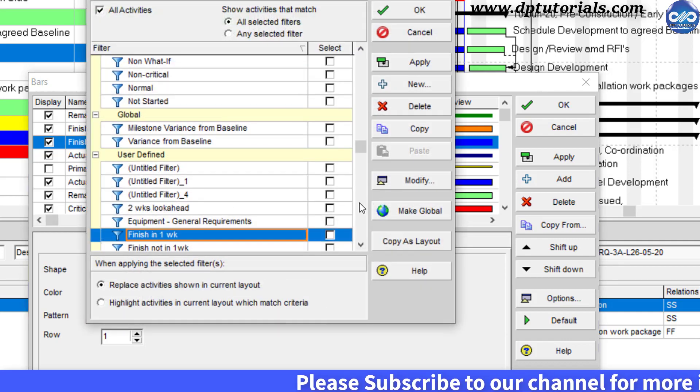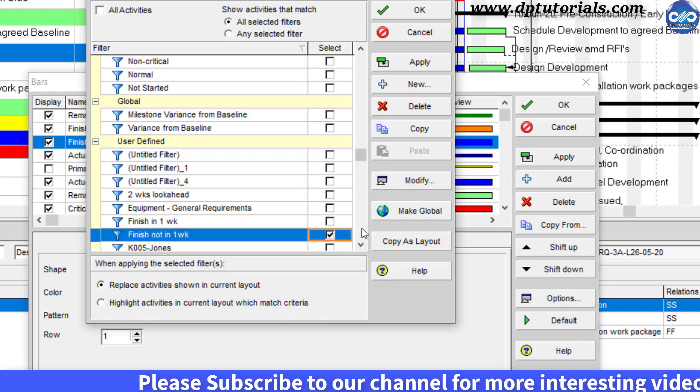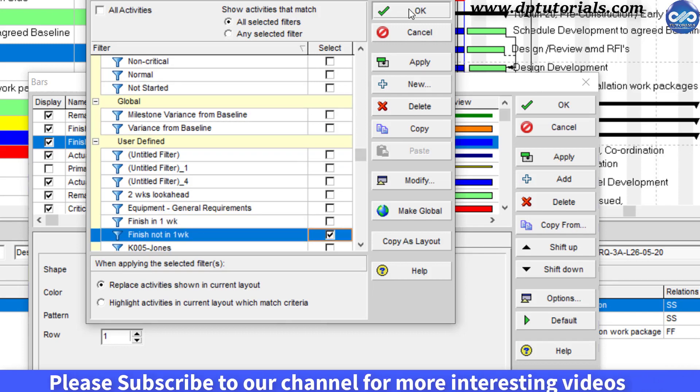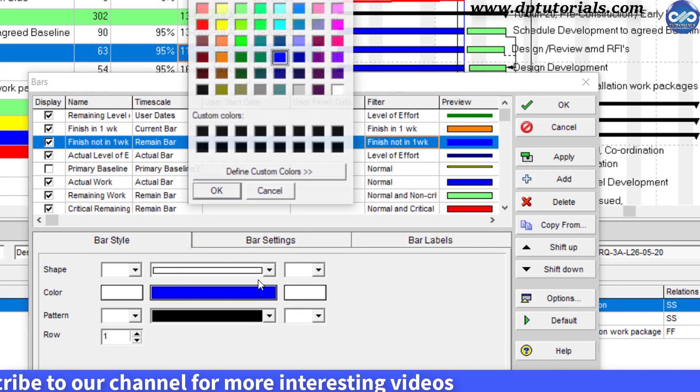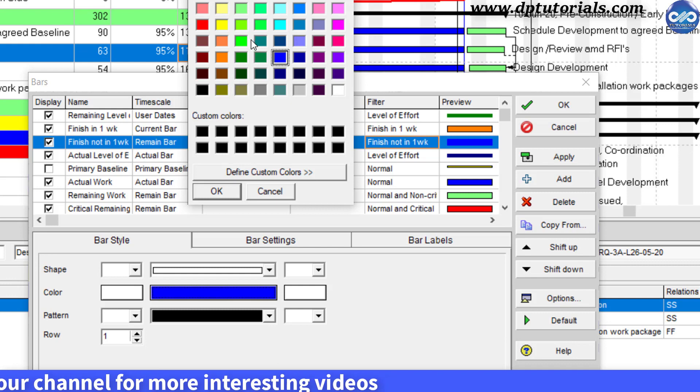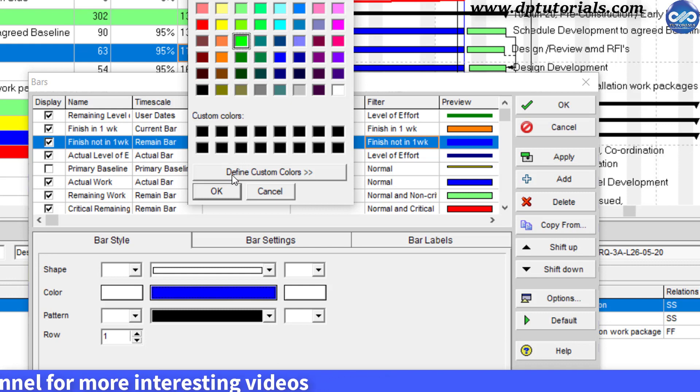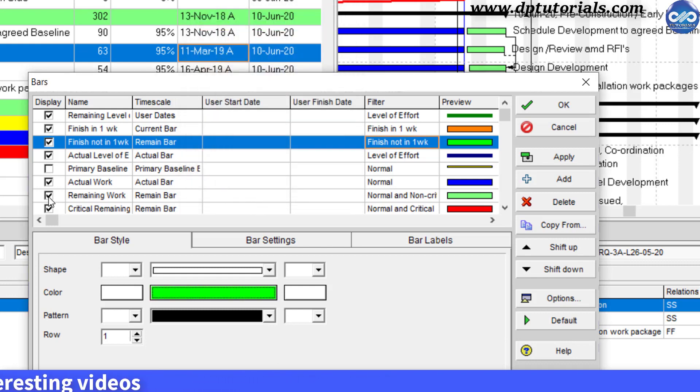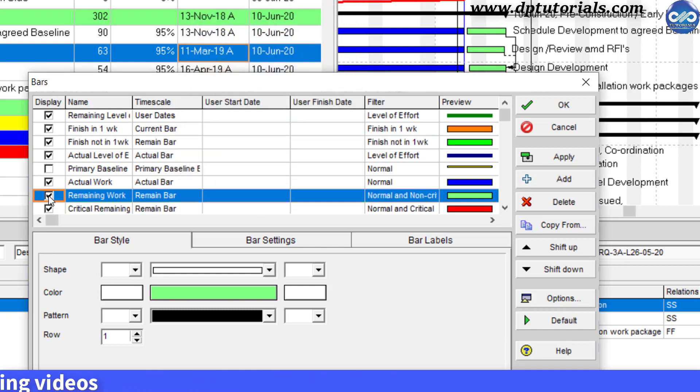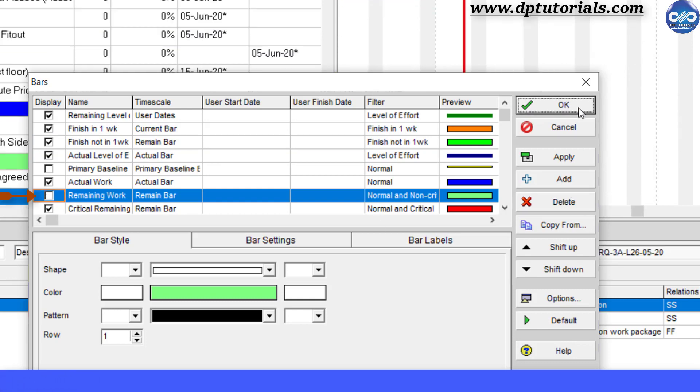Under filter, select our finish not in one week filter and select the bar color as green this time. And finally unselect the remaining work bar here which is in green color and click OK.